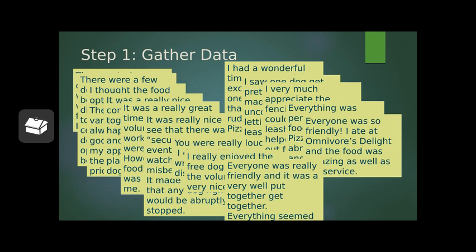Now, the challenge is to organize the data received so that they can be incorporated into the lessons learned document and so that future projects can learn from them. This also helps give some perspective to the data. So if we only received one complaint about hygiene, for example, we can compare that to our quality metrics and take a look at what is allowable versus what we ended up receiving. This slide shows all of the survey results. So this is the raw data that is needed to create the affinity diagram, which is completed throughout the day.